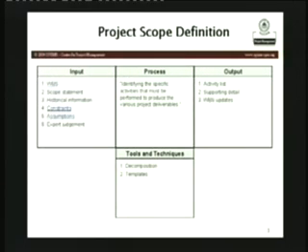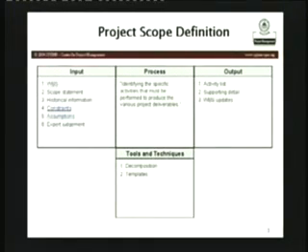And the technique for defining the scope is you look at the charter and ask the same question. What things will be included, what things will not be included. And that would be there from this point on. The output is going to be, from this scope, you'll come up with an activity list. How am I going to be delivering the different tasks, the objects, the different results that will be coming out. Supporting details would be there.